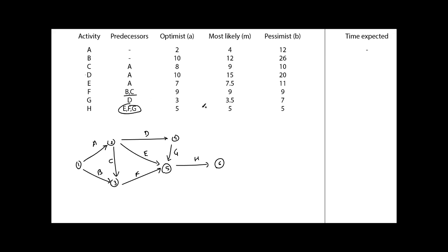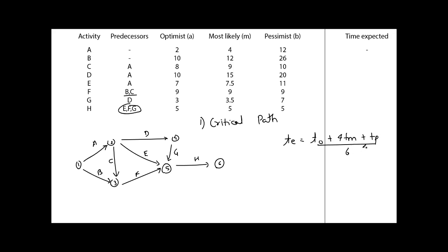The first step is to find the critical path, for which we calculate the expected time TE = (optimistic + 4 × most likely + pessimistic) / 6 for each activity. For activity A: 2 + 4(4) + 12 = 2 + 16 + 12 = 30, divided by 6 gives TE = 5. I'll fill in the remaining values — pause and try them yourself.